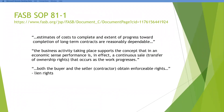I'm not going to spend a lot of time on these next two slides, but I would encourage you to go out and look at FASB's website. They do have a statement of position about this method of construction contracting and when it's appropriate to use. The main things to know about it are that you have to be able to reasonably estimate your costs. What you're selling is the progress on the job — that's what you're billing every month. And of course, both sides have to have some enforceable rights, which pertains to lien rights.